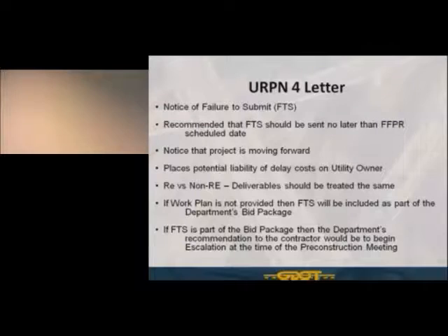Now, that's not necessarily a bad thing, but what you've done by allowing it to get to that point instead of providing that utility adjustment schedule prior to the project being let is you've brought the contractor in, which, as I said, is not necessarily a bad thing, but you brought another party in on the discussion at that point, because the contractor has a responsibility then to complete that project in accordance with the department's contract time schedule. And so he therefore has a responsibility to the department, and he gets to provide comments as to how your proposed schedule may impact his work and his ability to deliver that project on time. So that's just something to keep in mind if we've gotten to that point.